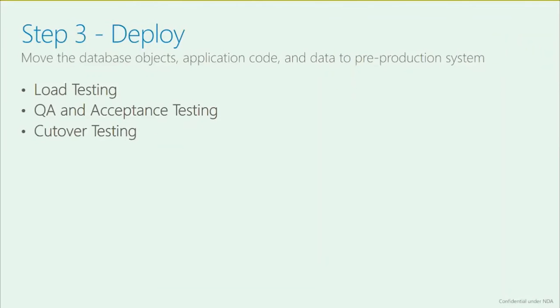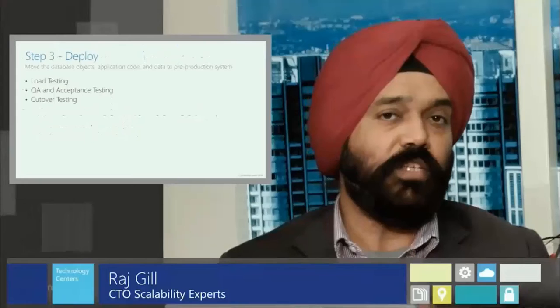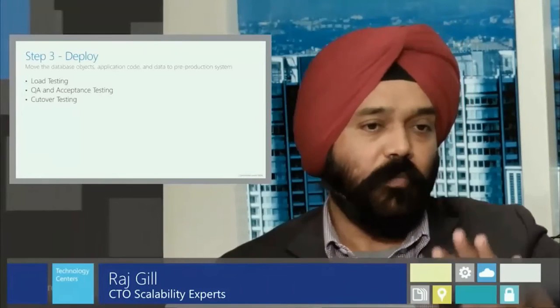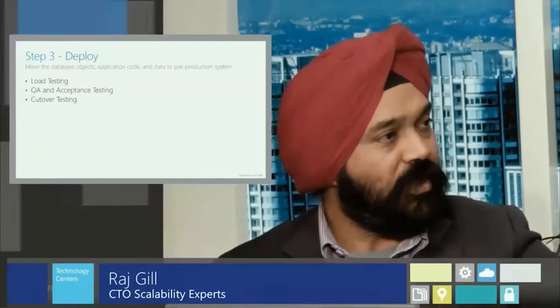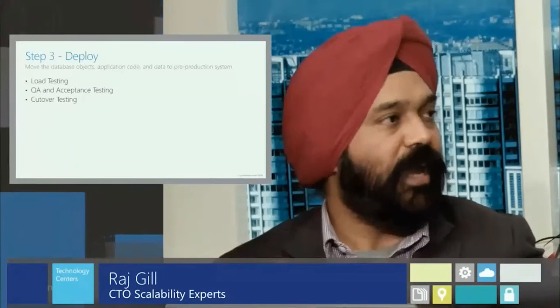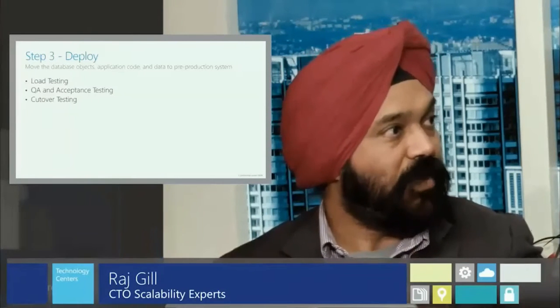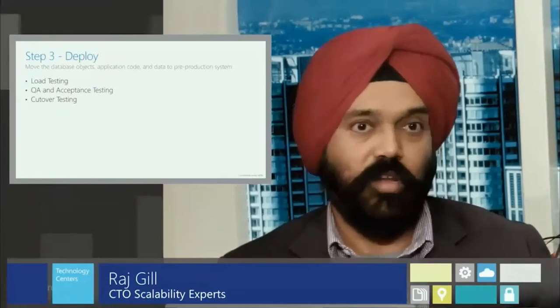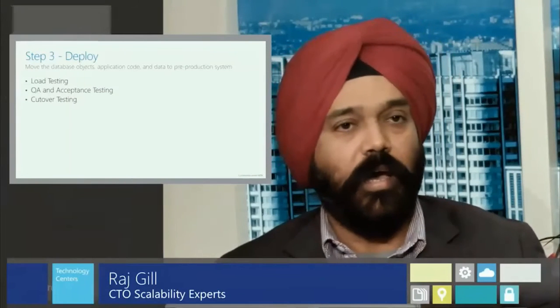Right. So this is where proper load testing or performance testing becomes very important. This is where we encourage customers to make sure that, on top of the UAT and the functional testing we talked about, there's a proper load testing plan in place in the deployment step. So this is where you would define, hey, how do I run this concurrent load test? Obviously there are third-party tools that can be used to do the load testing.